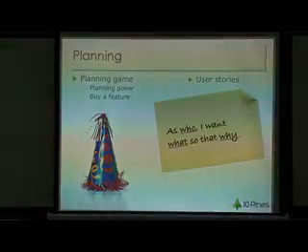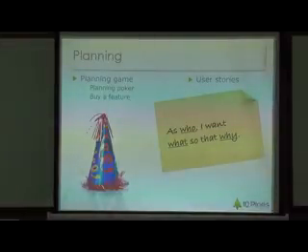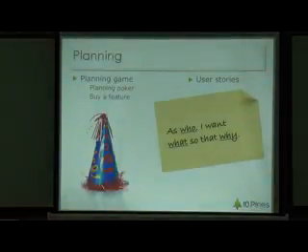So the other aspect is planning. These are some practices related with planning: planning poker, and one nice game is Buy a Feature. Do you know Buy a Feature? No? Okay. Buy a Feature is where you have some bills and you give the bills to the product owner, and when you have the planning meeting, the product owner has limited money to buy some features.